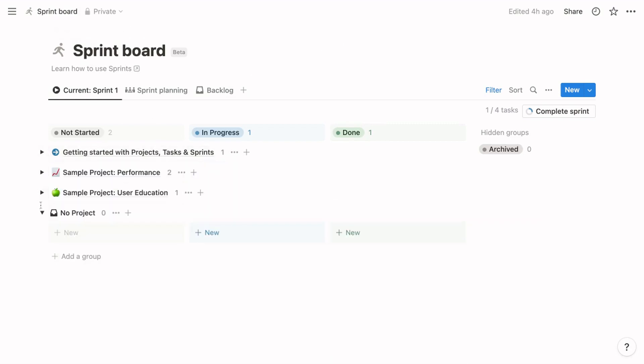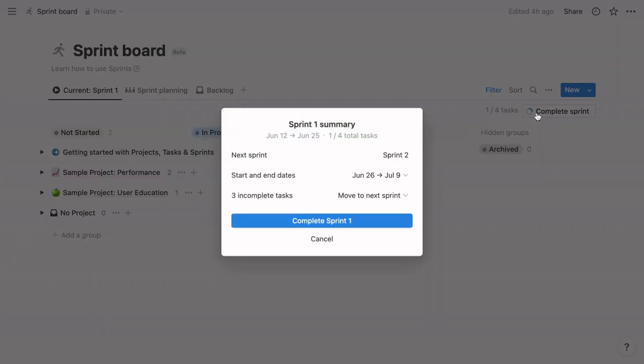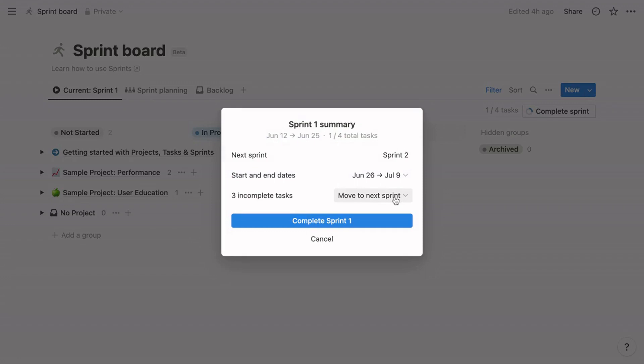At the top right of the view, you'll see a special button called Complete Sprint. When you click it to advance to the next sprint, you'll see a module that allows you to specify which sprint to update to current. You can also modify that sprint's date range. If the sprint you're completing contains any uncompleted tasks, you can move them to the next sprint or to the backlog.